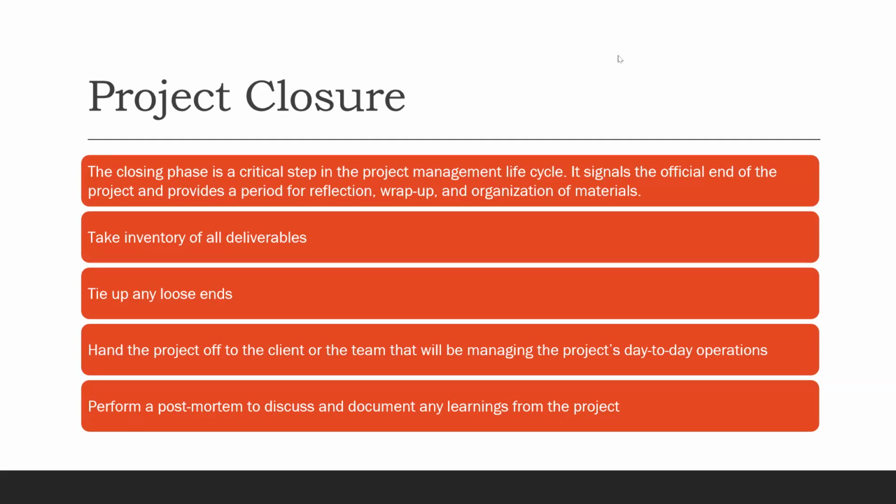Then you hand off the project to the client or the team that will be managing the project on a day-by-day basis. I made an example earlier and I said, let's say, for example, you decided to install water taps in a certain county and your project was the installation. And you started, maybe you pilot it for 3 months or for 6 months, but now you hand it over to the individuals in the community that will be in charge for the management on a day-by-day operation. I also made an example and I said we had a child labor project and the Ministry of Labor were the custodians of this project.